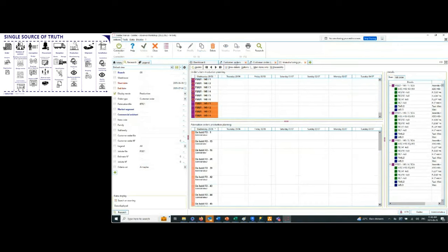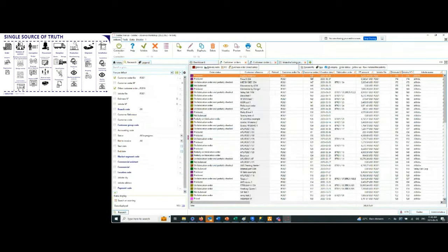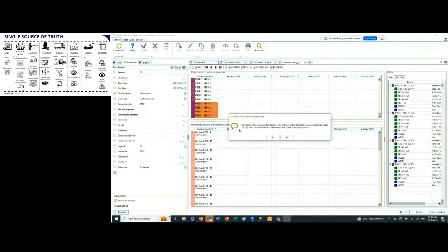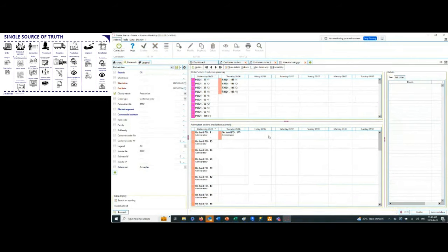So just going back to customer orders, this is the order that we just created, 149, and the 4 different assemblies that we imported. From here, if I wanted to, let's say, fabricate all these assemblies tomorrow, I can just drag and drop it in my schedule board, and you'll see it's generated a new fabrication order number, 135, because ultimately you can have more than just assemblies pertaining to this customer order in one single fabrication order. That's why there are 2 different numbers associated.